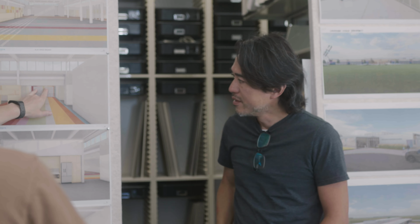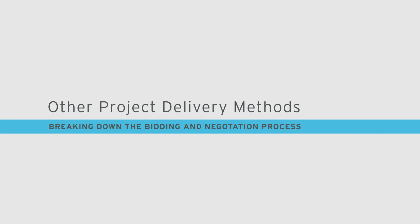This situation is far from ideal, and your architect should estimate costs throughout the design process to keep the project within budget. If the architect is concerned about the bidding climate or unstable construction costs, they may factor in a bidding contingency into your budget or plan for alternates within the project's bid. An alternate is a separately priced portion of the project identified within the bidding documents that provides an option to not move forward with that portion of the work if the project bids higher than anticipated.